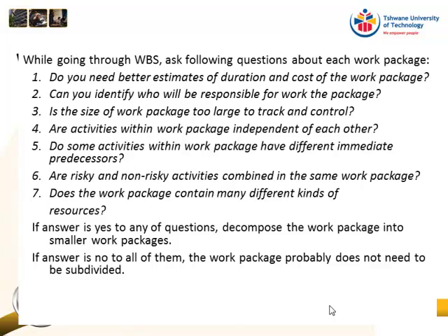Week 2 you say, okay, how far are you with doing this? And Alina says, oh well, I'm done, so I can take the next work package that needs to be done. Lufuna says, I'm halfway, I'm on track, I should be finished by next week. And Kamiso says, we underestimated the effort on this task, we should have given it 3 weeks, so let's adjust the schedule accordingly. So do you understand? Because we have weekly meetings, the 2 week work package intervals make sense.